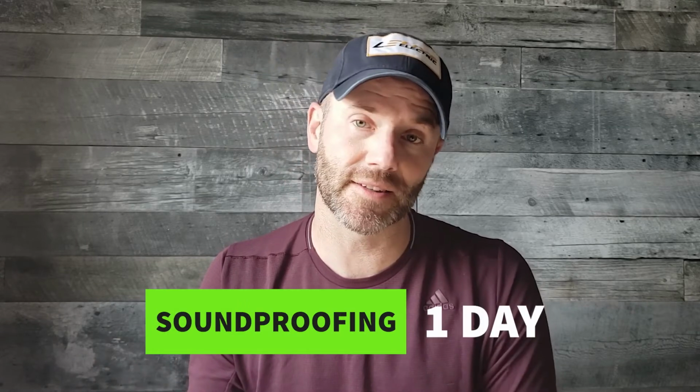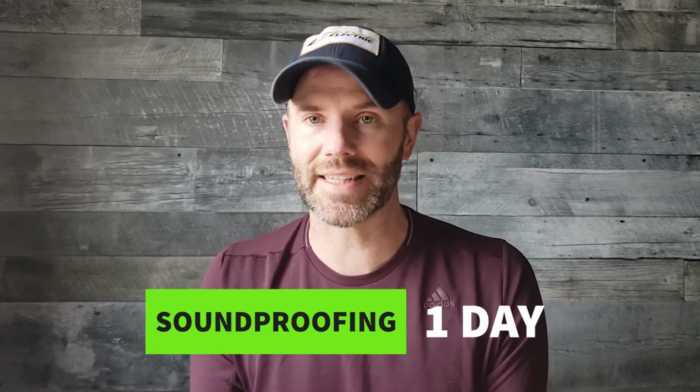It won't take a full day, but we're going to allot a day because what if they arrive late? What if somebody's a little bit longer the day before? One trade, 1 day, that's what we're doing as a minimum. Now that you've got your rough-ins and your mechanicals all done, we're going to do some soundproofing. So we're going to put soundproofing insulation in the ceiling. That's going to be a day.